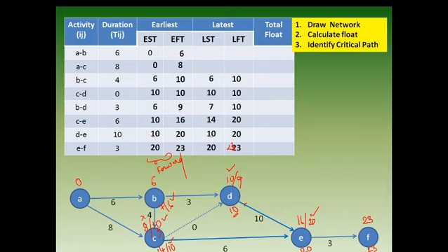Okay. Now we have A to C. A to C 10. 10 minus 8 we get it as 2 over here. Okay. Now look from here 6. B value, smaller value we have adopted. 6 minus 6, which is nothing but 0. Done.